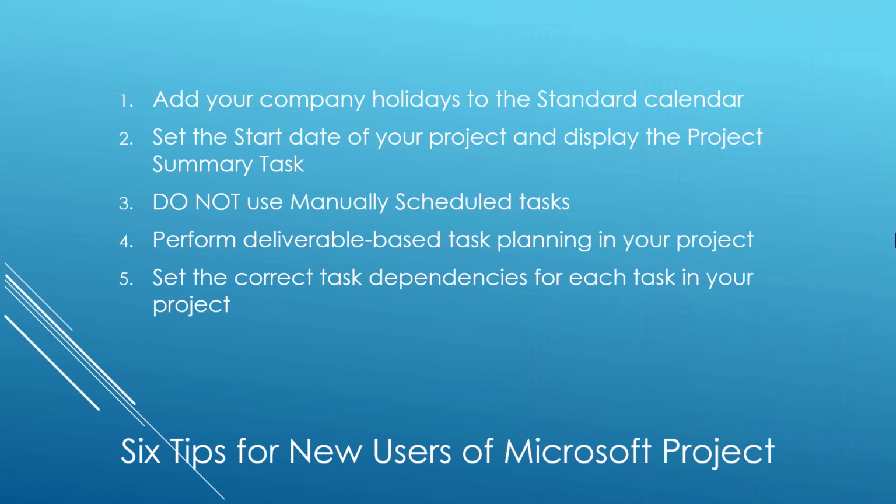My sixth and final tip is to create a timeline view of your project. If you have a project client or project stakeholders, you probably want to show them a simplified version of your project that includes each of the deliverables and probably key milestones as well. That is the exact purpose of the built-in timeline view in Microsoft Project. So let's take a look now at a video that will teach you how to create a new timeline view in your Microsoft Project schedules.